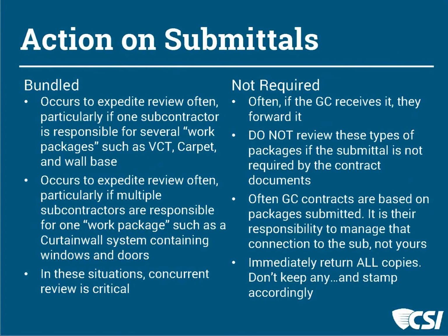For example, in a curtain wall system that has windows and doors that are being provided by a different supplier, then they need to see this together. So we want to know that all those parties have looked at these. So we want you to bundle some of these. And sometimes it's important to have concurrent reviews.